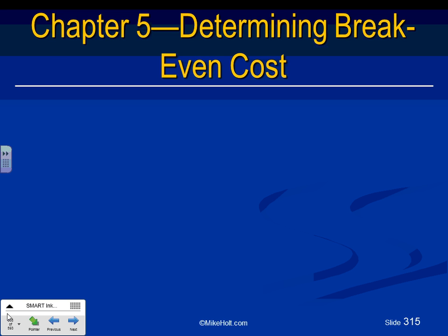Pricing and laboring, no question asked about this one in the commercial project. That's step number 4, guys. It's all in the McCormick software that we use. Extending and totaling, done for you. You guys remember when I walked you through the software, you hit extend, and based on the labor units and the price unit that you want, it extends everything for you. So that's step number 5, extending and totaling.